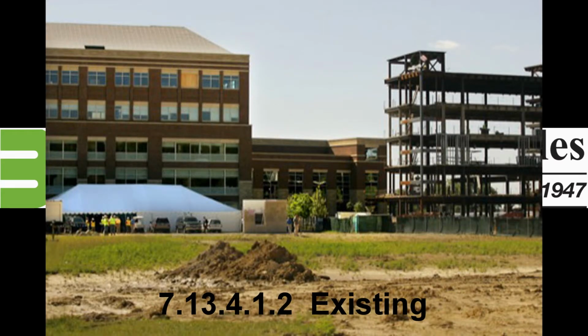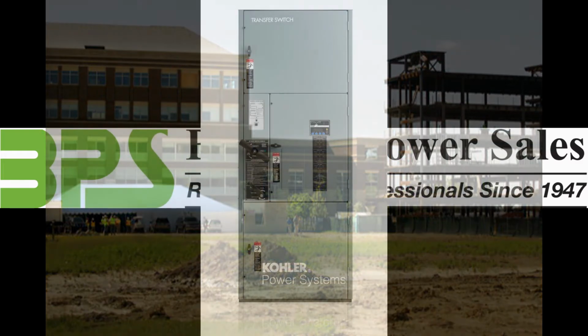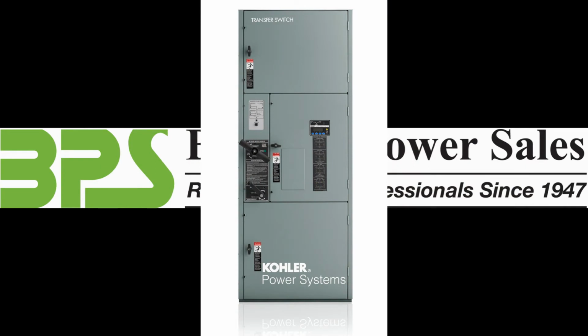So why bring all that up? It's because when there's an existing facility and we're adding to it, we can do the acceptance testing by simulating an outage at least one transfer switch, or we can initiate opening all switches or breakers supplying normal power to all the automatic transfer switches that are part of the new emergency power supply system that's being commissioned.